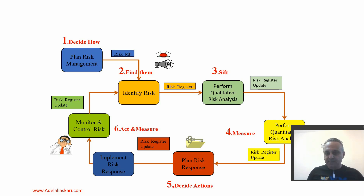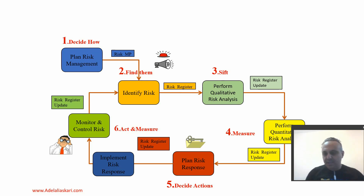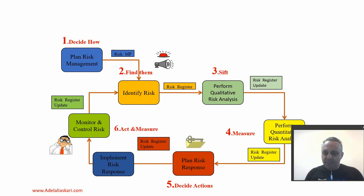After having the risk register, we know that not all risks are of equal importance — some are more important and some are less important. Accordingly, we continue with qualitative risk analysis, categorizing risks based on their probability and impact into most important, medium level, and less important risks. Then in the next step, we move to the quantitative or numerical assessment of risk analysis, and this is the moment that the software steps into action.